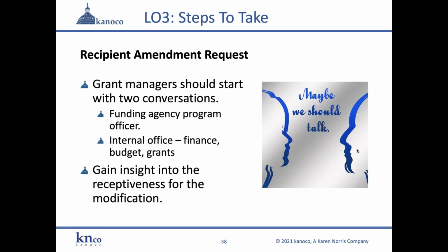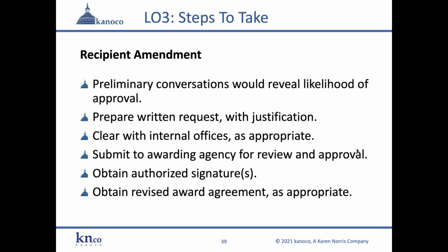And then the funding agency conversation, you want to test their receptiveness. Do they like the idea? I mean, why go through the trouble of preparing this entire written amendment request if the funding agency is just going to say no? So it saves a lot of time to talk to them first. You want to gain insight into the receptiveness for the modification. So these preliminary conversations would reveal the likelihood of approval.